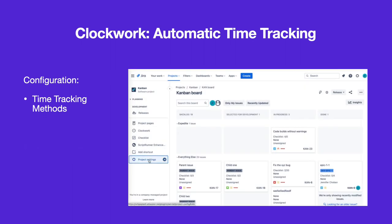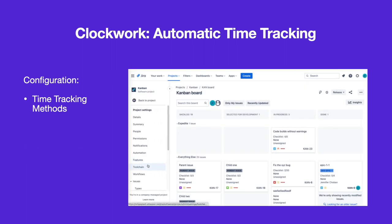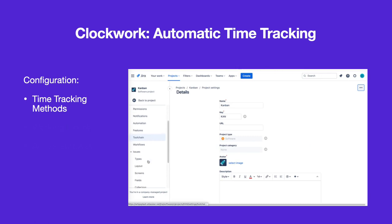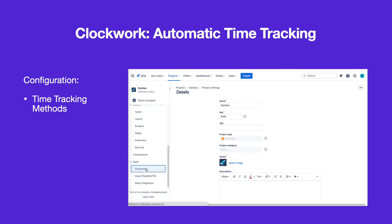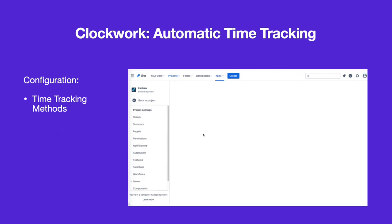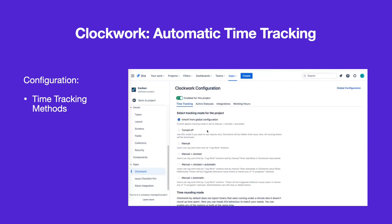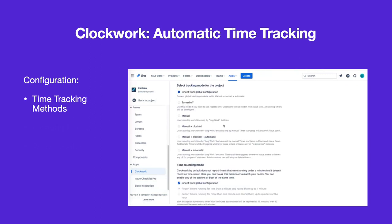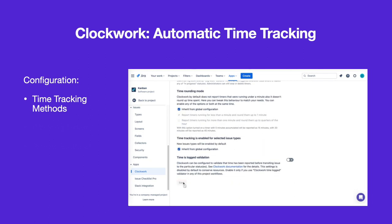The time tracking method can be configured at the project level or inherited from the global configuration. To enable automatic time tracking for a specific project, navigate to Project Settings > Apps > Clockwork and select the Time Tracking tab. Select the time tracking method or methods that you want to allow in the project and click Save.